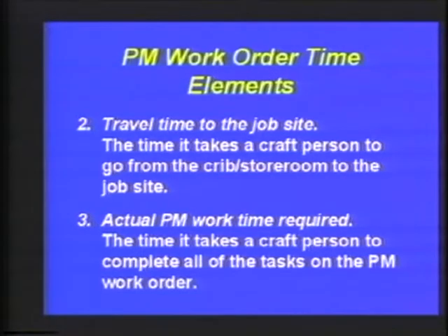And when we look at the actual work order time, I call it the wrench time, on step number 3, here we have to break that down into individual detailed steps. As an illustration, the first step may be a lockout procedure to prevent any injury or harm to the PM person. There may be a dismantling, let's say, of an end plate where I may have to change bearings.